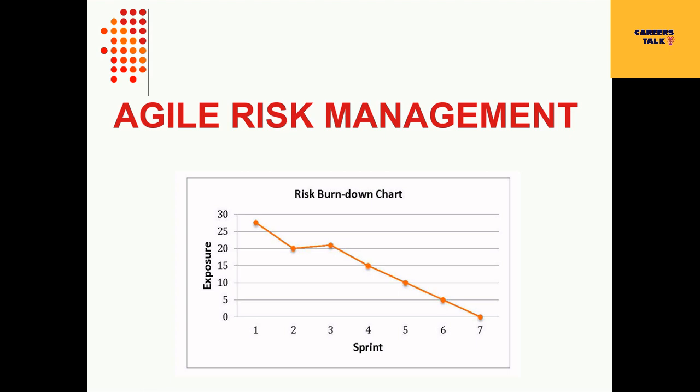Risks that are not addressed could lead to a reduction in the return on investment outlined during sprint planning meetings, due to lost velocity, delayed delivery of critical sprint features, and increased cost. In 2004, John Ridders addressed this through the creation of a risk burndown chart.